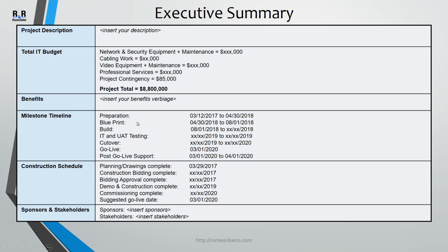But if you use standard practices and methodologies from PMI, you're going to have to outline the timeline for preparation, blueprint, build. You're going to have some sort of a user acceptance testing period. And then you're going to cut over. How long is that going to take to bring the building alive from an IT standpoint? And then you're going to go live.